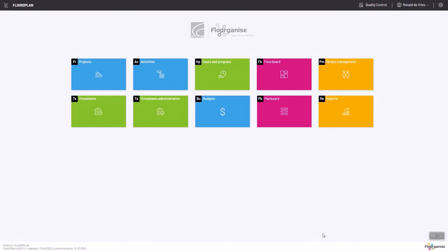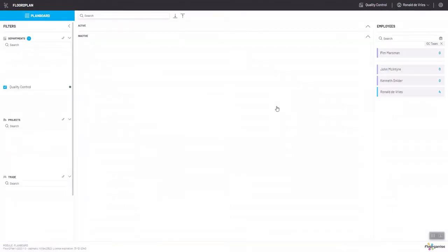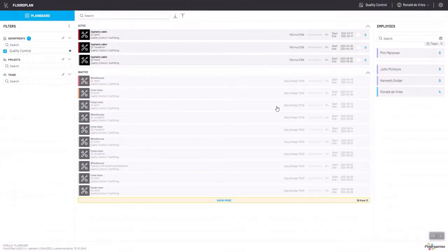While every yard is different and also every department has a different emphasis, we do have the ability within Flow2Plan to apply a very granular approach to managing teams and making sure that the hours spent on activities are correct. What we have for that approach, for instance, is here the plan board, where individual tasks are assigned to individual persons, making sure that the trade required, for instance welding certificates or whatever, match the requirements of the individual person.